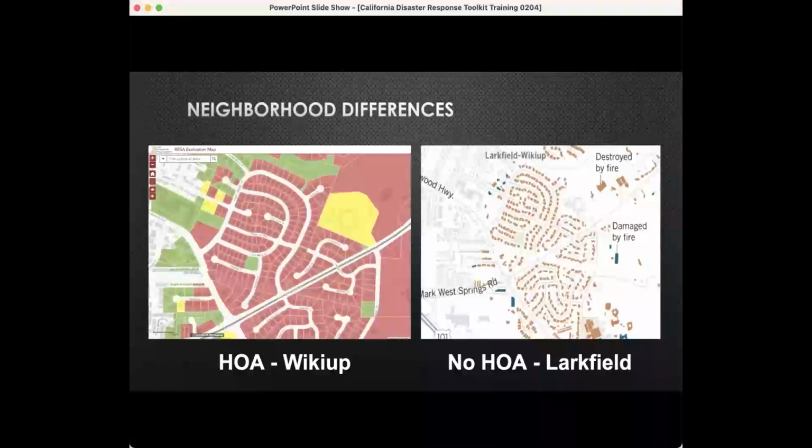We invited Stonefield up to Santa Rosa to meet with the Wickiup HOA. Not to offend the local contractors, but there was plenty of work for our local contractors. We needed a method to get whole neighborhoods back. They signed up half of the neighborhood in one night. The next day, they put 80 contractor signs on 80 lots for similar homes that these people had before.